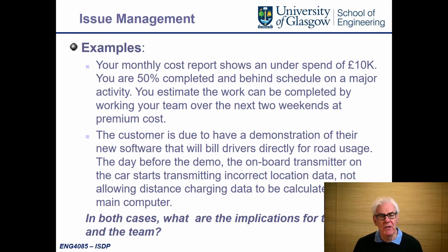Let's talk about issue management briefly. Here's a couple of examples. You've got a monthly cost report and you report an underspend of 10k. You're 50% complete and behind schedule on a major activity. You estimate the work can be completed by working a team over the next 2 weeks at premium cost. What would you do with the 10k? If the project is perhaps 50k, then 10k could have a substantial impact on the achievements of the project, and you may indeed be able to recover your project schedule.